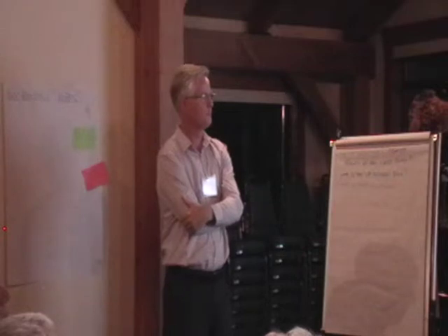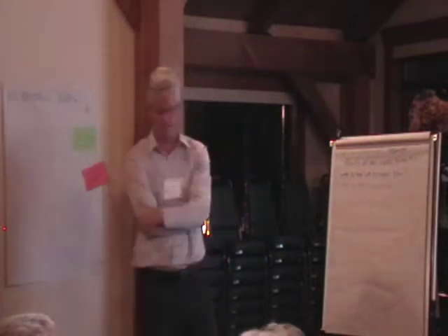So we need to build up the reserves so that when the project comes, we have enough money to actually build that project. So a water treatment plant, right now it's at capacity in the summertime. So we've delayed the expansion of the treatment plant. We're hoping to further delay it by doing universal metering. But say tomorrow we're at capacity, we keep running over capacity, we have to throttle down and tell people you can't. We have to go to stage 3, stage 4 earlier until we expand the plant. And right now we have $800,000 in our reserve. That plant costs $7 million. So we don't have enough.